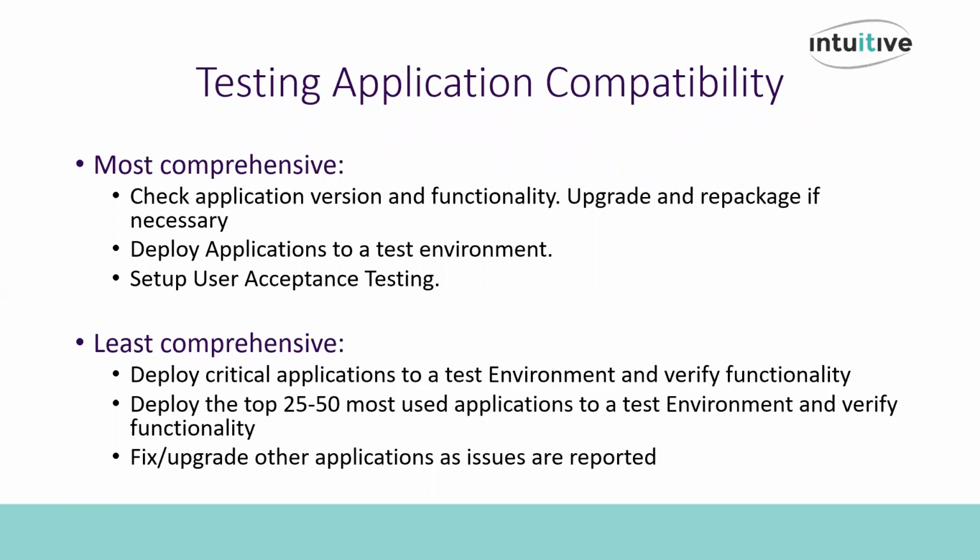Pros, I would say your pre-migration time would be significantly reduced, and you may not require as many dedicated resources as the first approach. Cons to that is increased workload post-migration and very fast turn time when it comes to fixing broken applications. You also may not have enough resources to keep up with the demands.